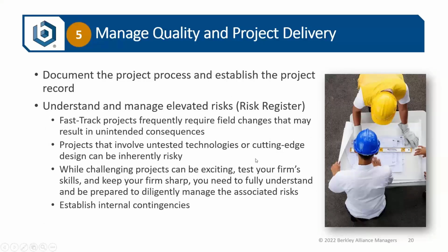So documentation of the project process and establishment of the project record is very important. It's the primary duty of the design professional until the project goes under construction. Now, if you have, in the construction management world, or if you've been selected as a general contractor with pre-construction services, you may have your own project documentation processes that you want to follow. I'm not necessarily saying you need to have a parallel set of meeting minutes, but you really need to look carefully at those meeting minutes and conference reports and other documents that the architects and engineers and owners are providing, as they impact project criteria and the services that you are providing.